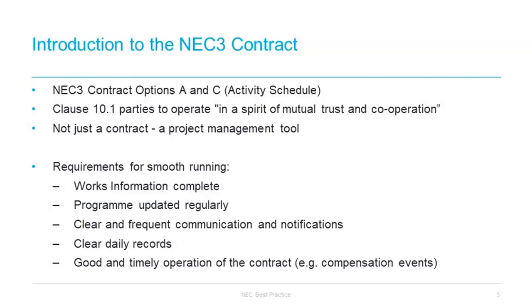These requirements are not always met, and running NEC contracts can cause difficulties. For example, the role of the project manager in NEC contracts is extremely important, and if the project manager is not acting independently, as he or she should under the contract, then disputes can arise and quickly unravel the spirit of mutual trust and cooperation.